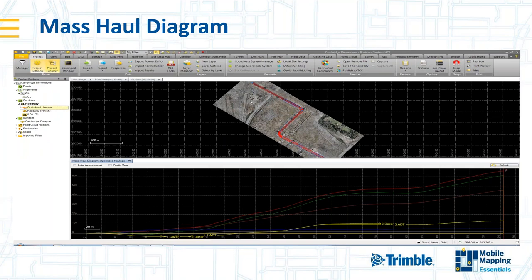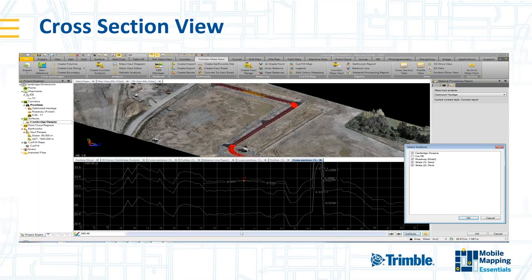You can produce mass haul diagrams that give an indication of how material is planned to be moved around the site. You can also look at cross-section views of the proposed alignment with layers representing different surface types — for example the finished roadway, a layer of sand, a layer of rock — all of which can be viewed and analyzed in TBC.